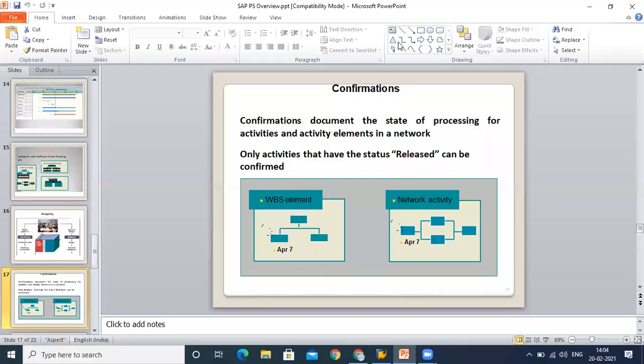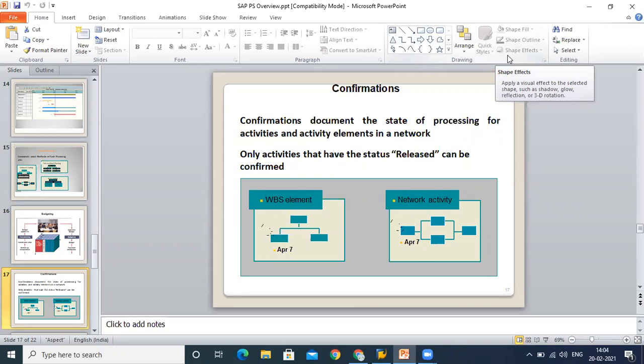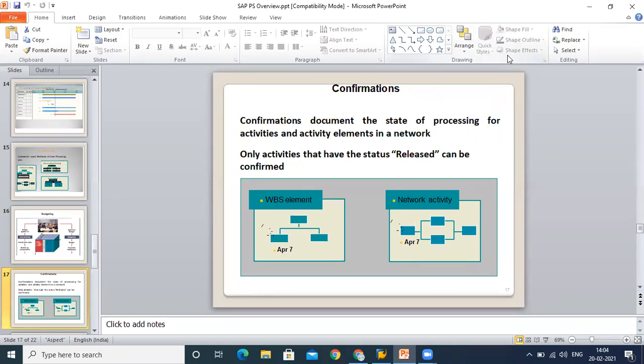Now we'll talk about confirmation. Till now we talked about planning in terms of time and in terms of money. What about the actual numbers? Let's say I define that my civil work will take 15 days—this is my plan—but how would I know whether it is on track or not? To capture the actual progress of your groundwork, we use one concept which is called confirmation.